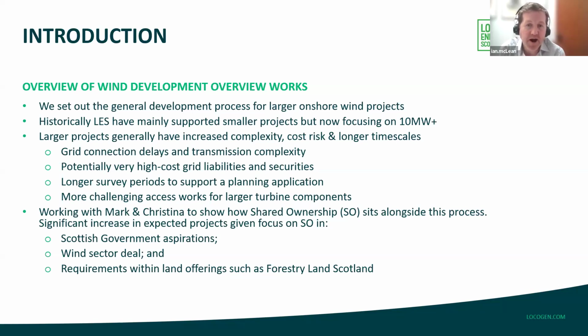Alongside the more complex grid works, there's more significant grid liabilities and security payments that need to be paid or accepted as grid connection dates get closer. And this is not something that generally smaller wind projects have needed to accommodate.